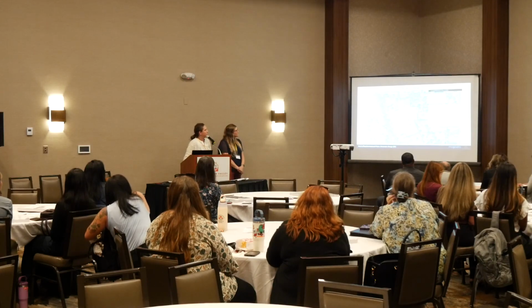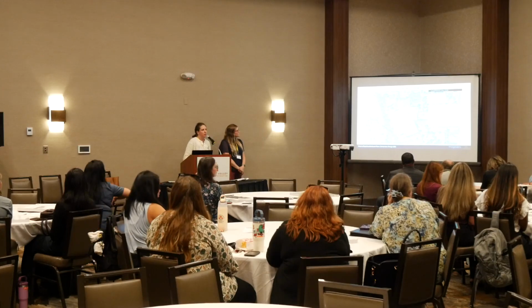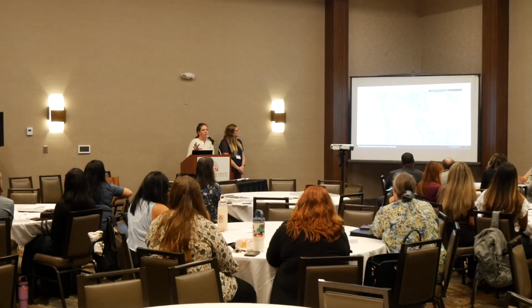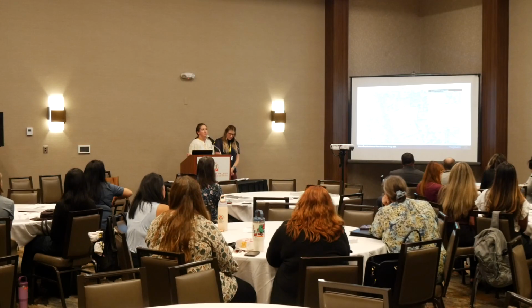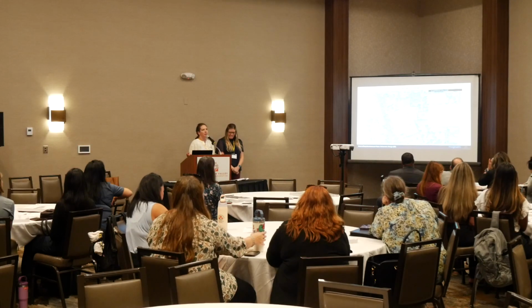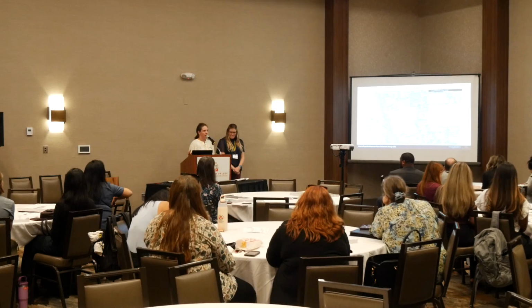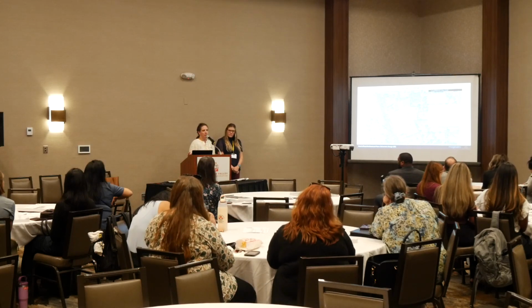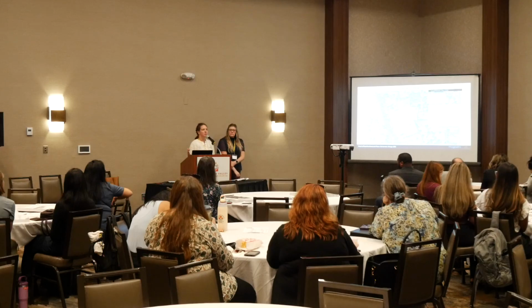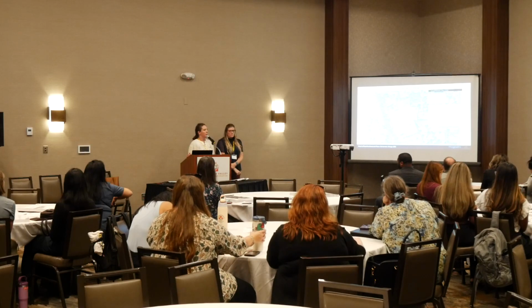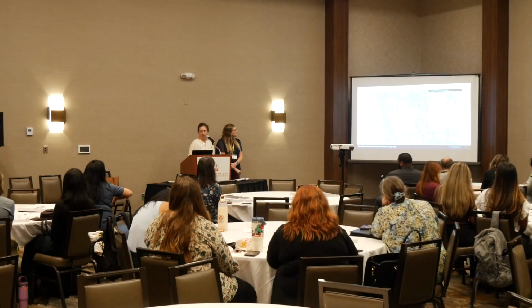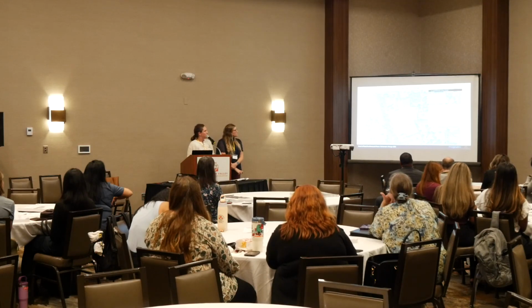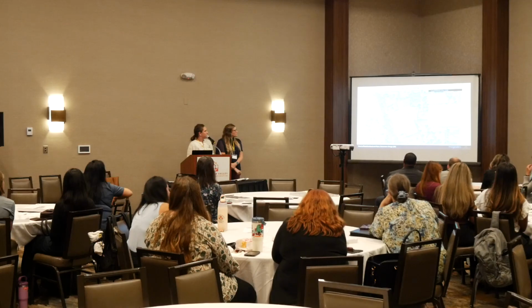And so during schematic design, this is also when we often use a schematic design set, or somewhere in between conceptual and schematic, when you might need to submit for funding. A schematic design set will usually have a site plan, some floor plans, some enlarged unit plans, and elevations. Those seem to be the things that help with applying for funding or applying for entitlements with the jurisdiction. And so that's what we'll use the schematic design set for.